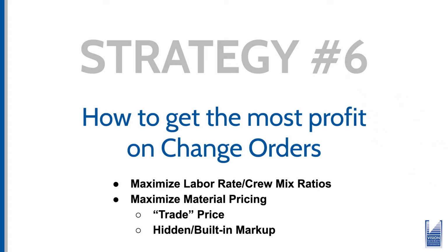Change orders are a really important part of managing the job. Whether it's a formal contract or just a discussion with the owner or the general contractor, you probably want to establish what your hourly rate is going to be. Now in EBM, you could have different rates for the change order than you did on the bid, and I would expect that to be the case.